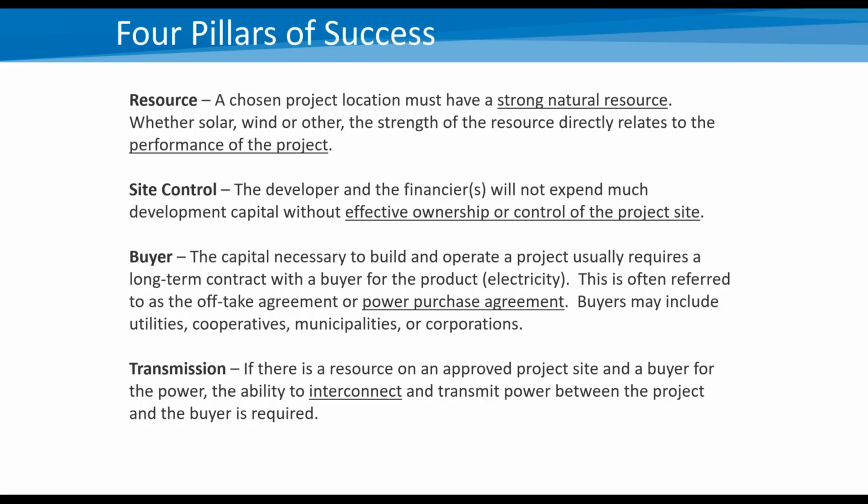The second thing on this list is the site control, and the point here is that in order for somebody to spend development capital, and certainly for a financier to invest in a project, and these projects are pretty expensive, they have to have some sort of ownership or control of the site.